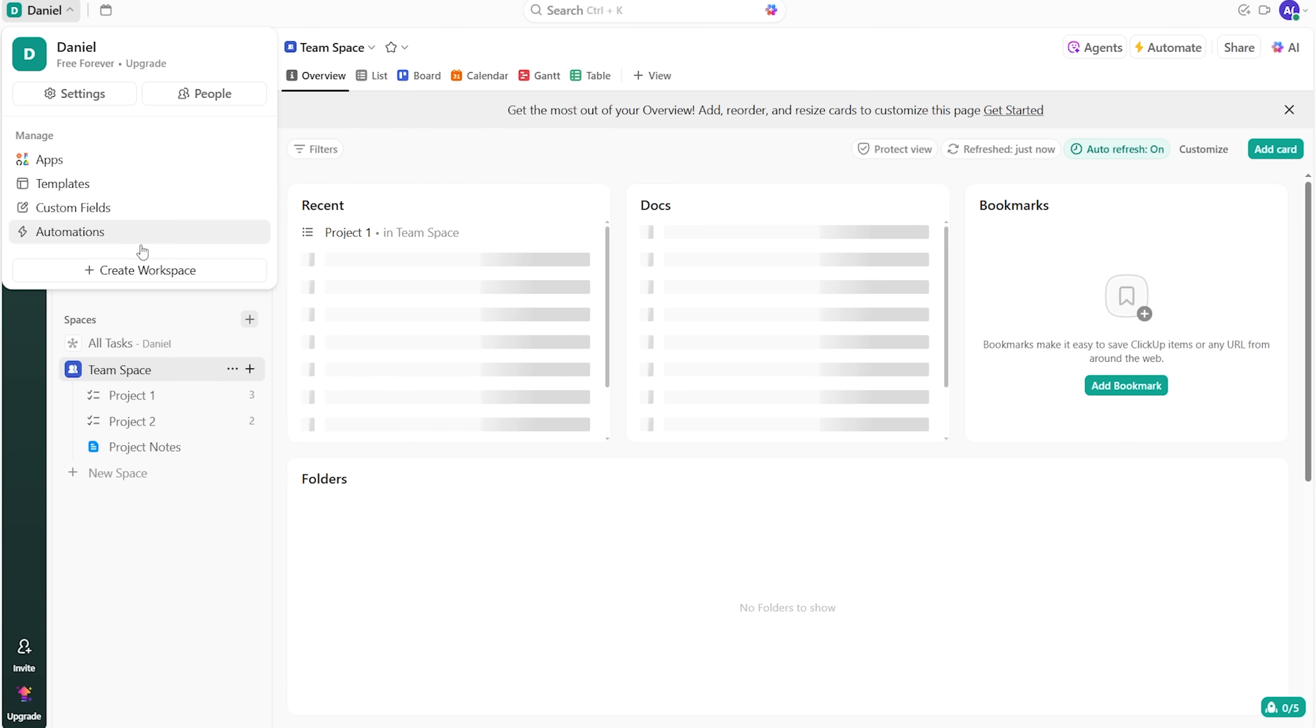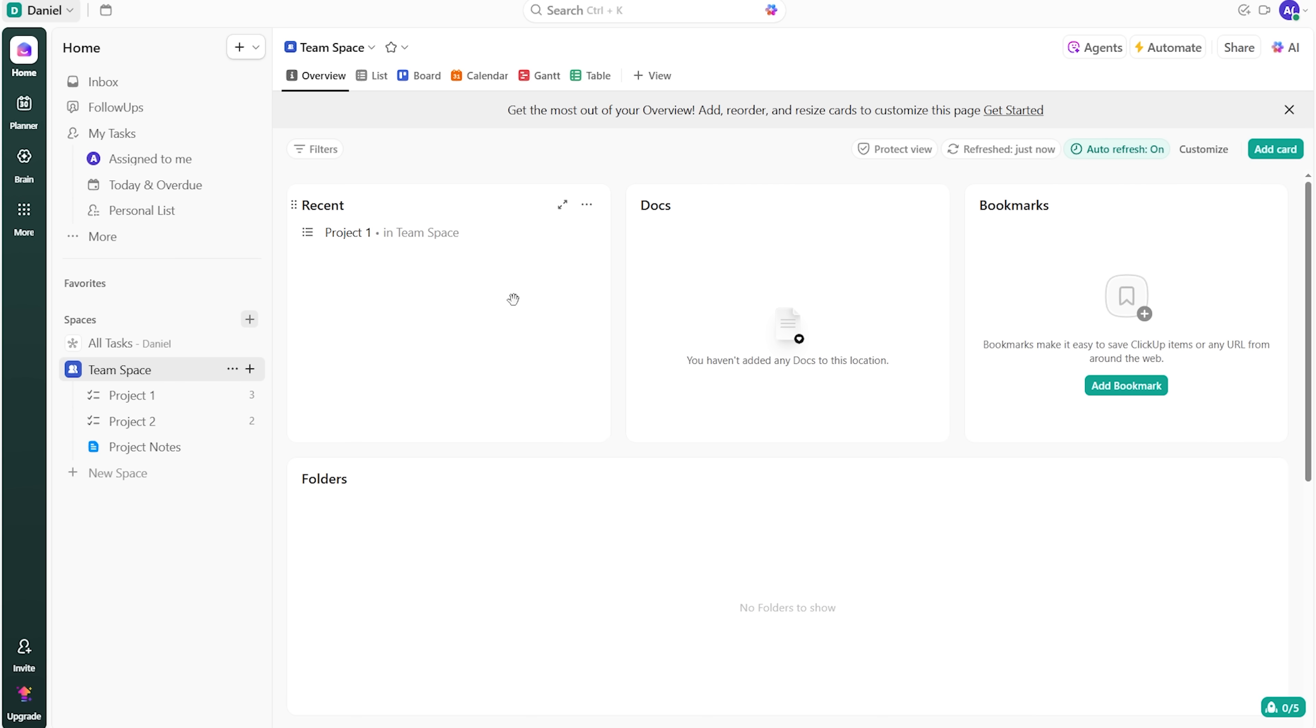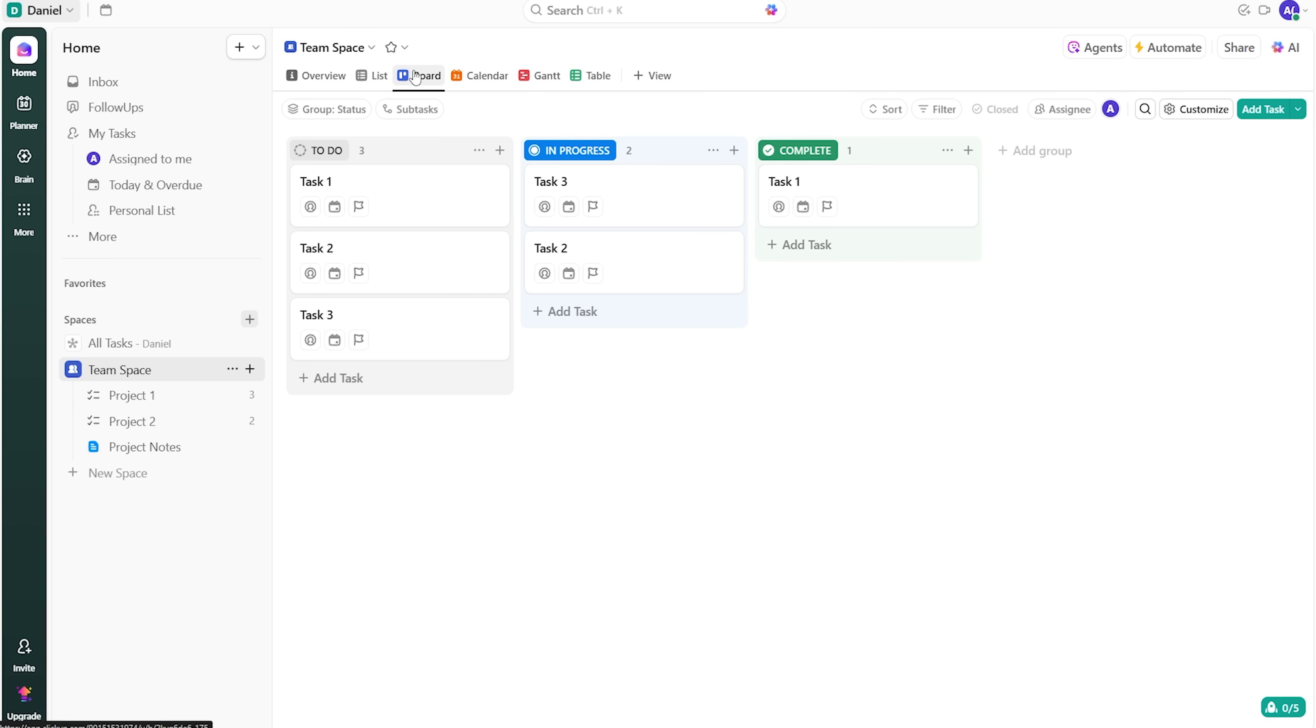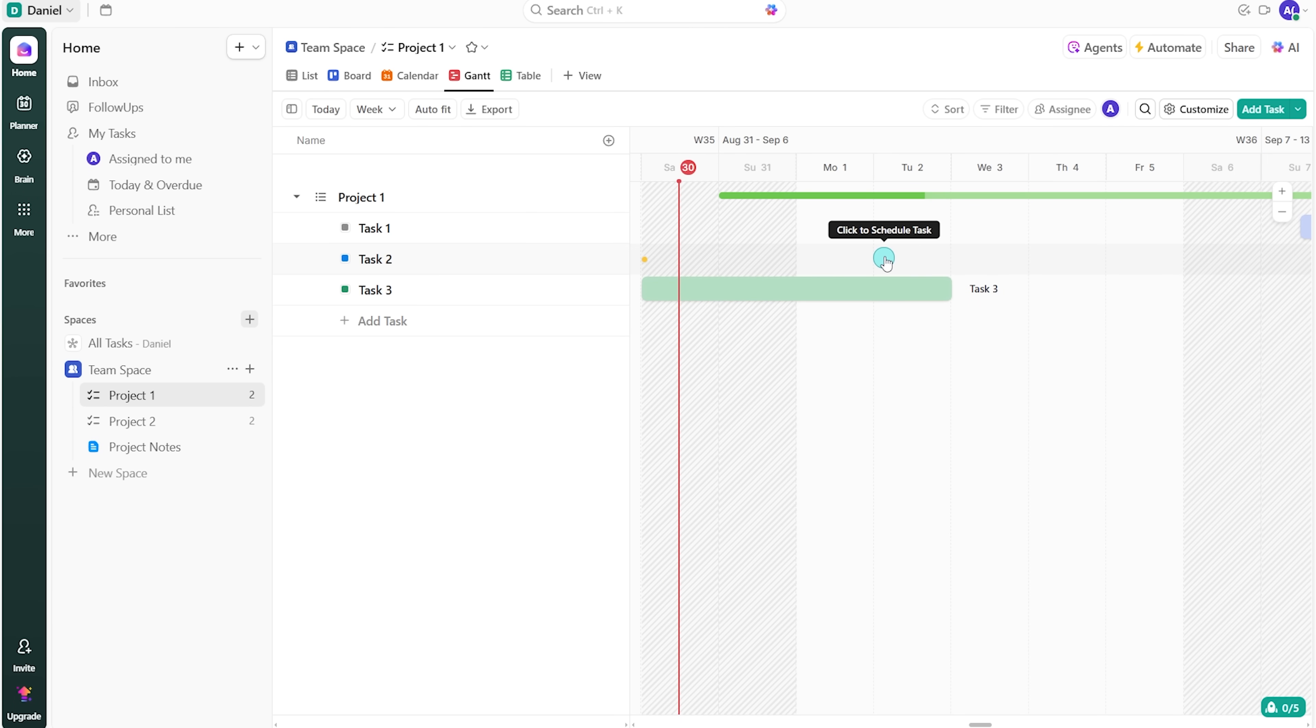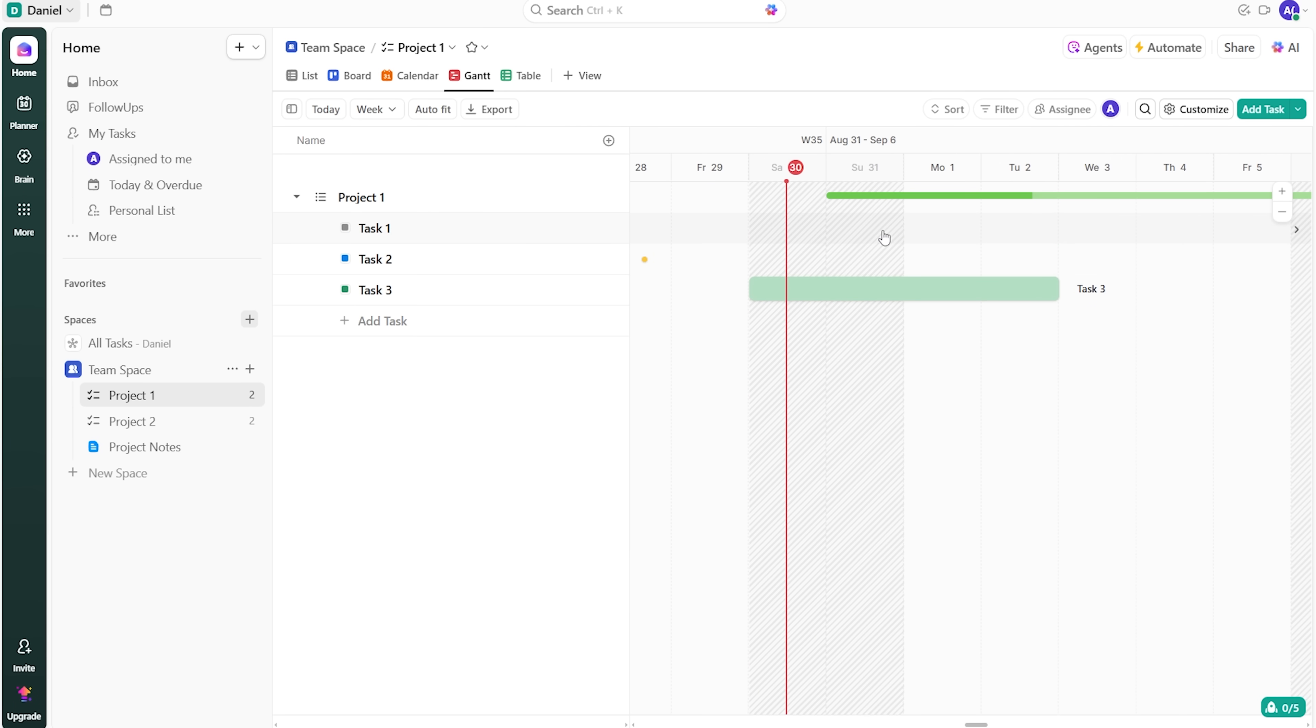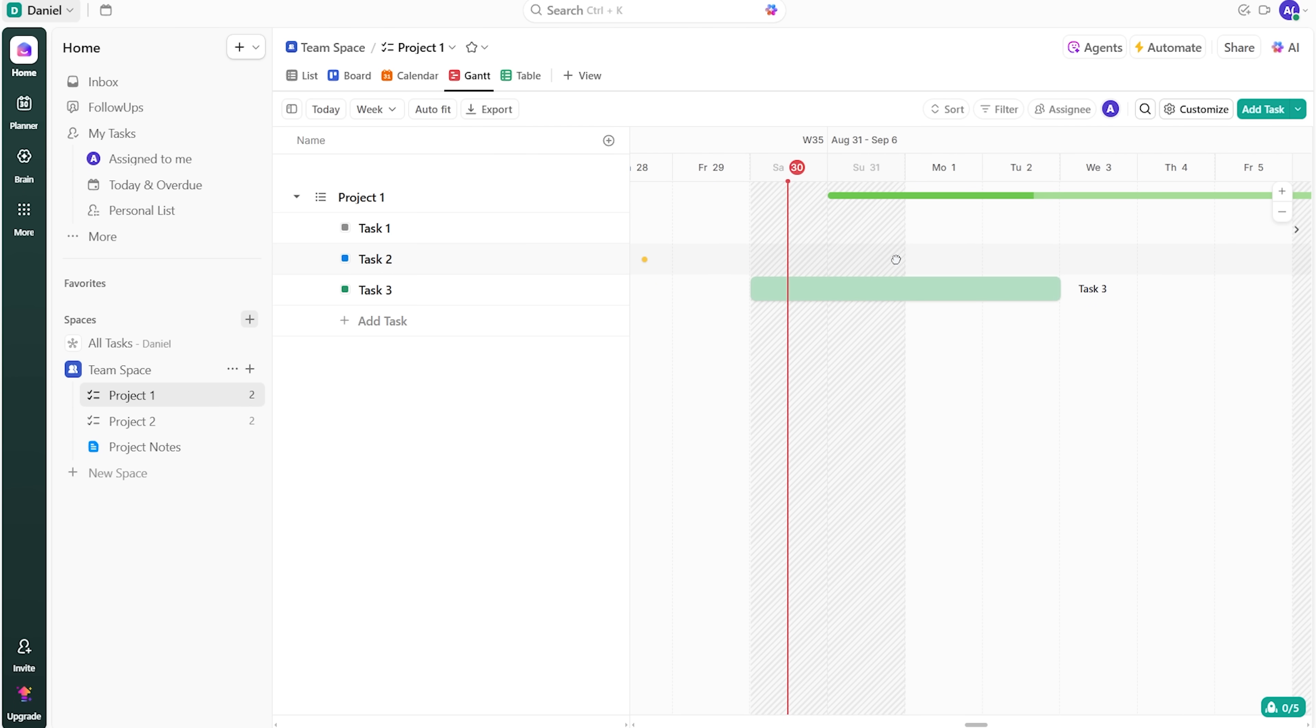Because it offers so much, ClickUp can feel busy at first. So, it's better to start small, set up one space, pick two or three statuses you'll actually use and hide the extra modules for now. Once your workflow starts to click, you can turn on dependencies or time tracking. Then you'll be ready for monitoring metrics and enhancing the processes.